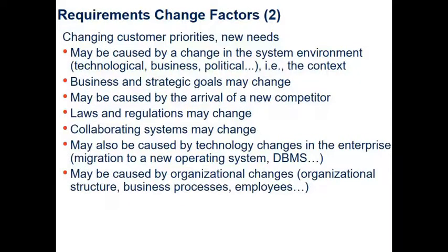Some factors that lead to requirements change include the following. Changing customer priorities. So customers come up with new needs. They may be caused by a change in the system environment, like technological, business, or political change in the environment. Business and strategic goals may change, may be caused by the arrival of a new competitor in the market. Maybe laws and regulations have changed. Maybe now you have to collaborate with different systems.